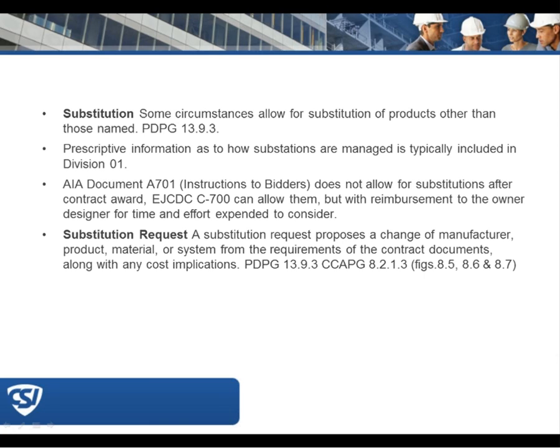And so if I have a certain kind of process equipment specified for a project, and a contractor comes back proposing a substitution with something that accomplishes the same job but is a different type of equipment, clearly a substitution. And we have received requests for substitutes like that and rejected them. And we've rejected it successfully.